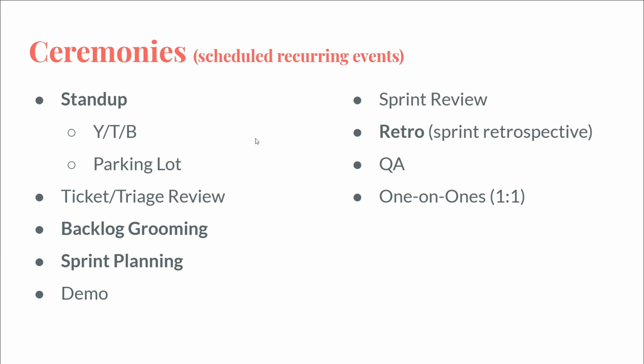Demo is a process where you get all of your stakeholders in the same room or on the same voice video call, and you demonstrate the changes that have happened recently. So you demo all of the code that got merged into prod in the last 2 weeks or whatever. So you demo all those things, and you also get their feedback and say, this is what we actually built.